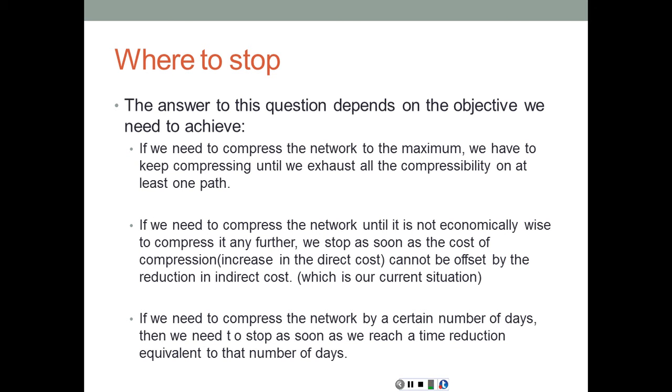So we can do that, but as we have already noticed, it's going to be on the more expensive side, because we are not saving any money by doing that. We are spending more money. If we need to compress the network until it's not economically wise to compress it any further, then we have to stop here, because compressing further is going to result in more expenses, and that's not economically meaningful.